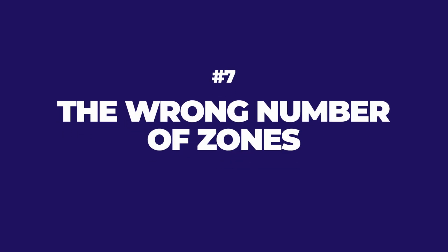The first one is the wrong number of zones. If you have 2 zones, your overall phase will take this long. If you separate that and actually have it be 4 zones, your phase will shape like this and it will actually go faster. If you have smaller zones and actually more zones, it will actually incline farther. So depending on how you've actually zoned your phase, and I've drawn this by the way, we can link you to the book Takt, Steering, Control, or to other videos where I draw this, but the bottom line is how many zones you have affects the overall duration. And if you have zones that are too large and too few of them, it could be constraining your system and causing you to go slow, and it could be your most limiting factor.